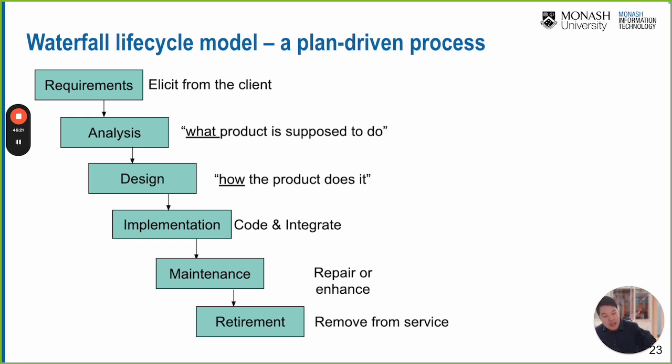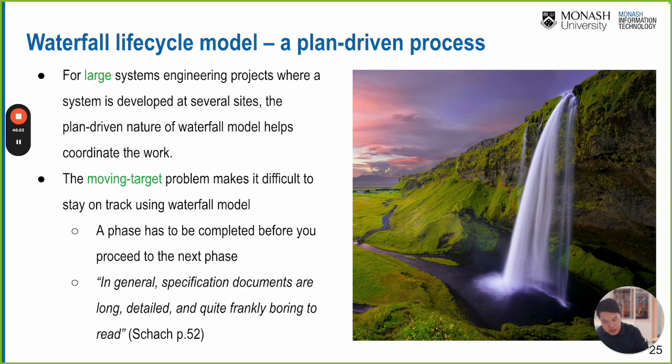But once the plan is concrete, let's say tomorrow the customer says, hey, I don't want just this kind of calculator application, we want more features around scientific calculators as well. Add more buttons, scientific features, that kind of thing. When the plan is concrete already, it's a bit hard to change. That's the downside of the waterfall.